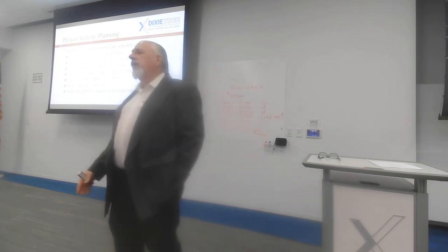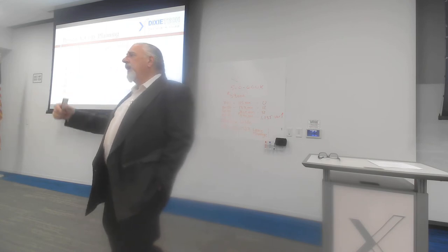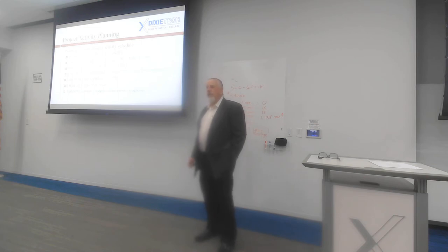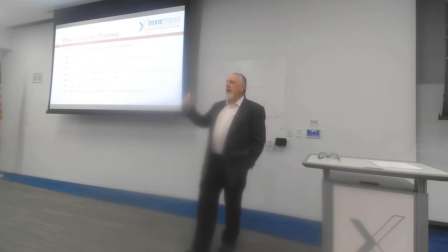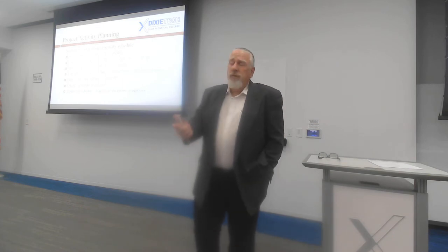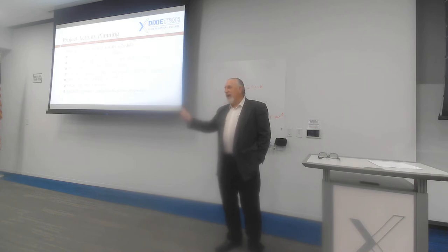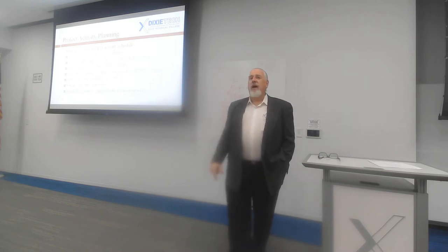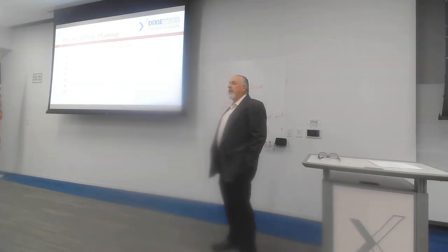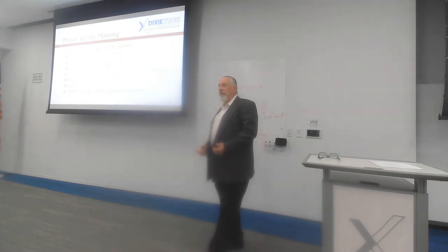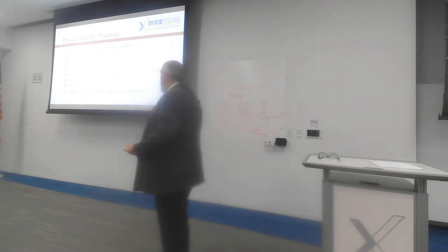If we are expected to deliver before the critical path projects that we can deliver, we have a problem. We have to manage that on day one, try to see where can I buy time, how can I do this in some other way. Most of the time there is another way, but we want everybody to know that as early in the project as we can. So that's why we do this planning up front, so we can talk about the schedules, we can talk about the deliverables, and we can talk about the dates. And if people start to have problems with dates, I'd much rather know it before we've done anything than after we're in the middle and we're scrambling to try to survive.